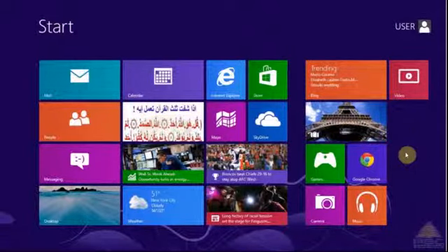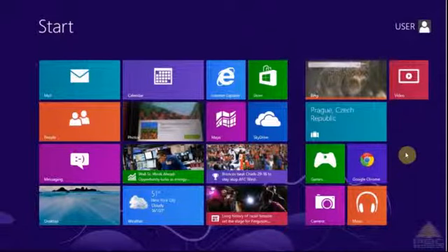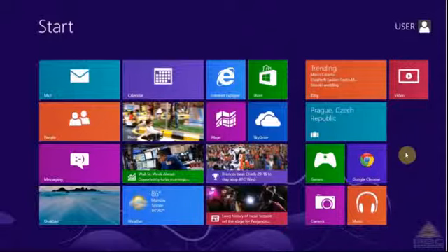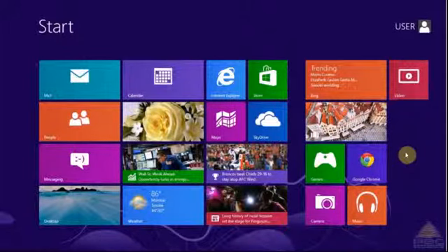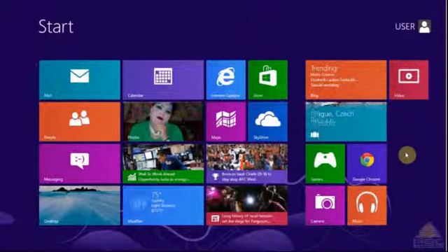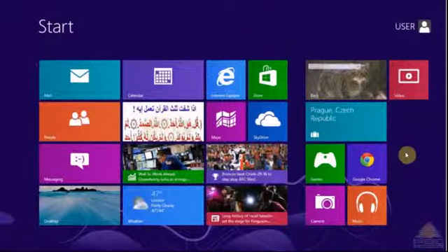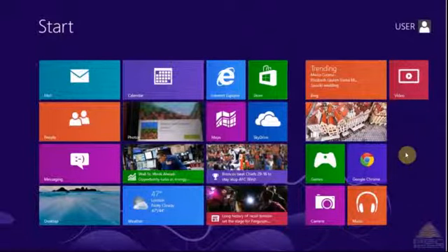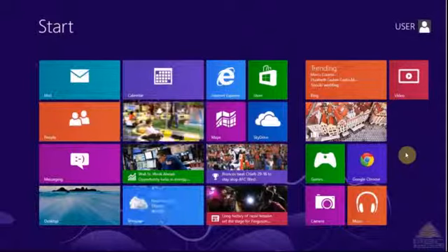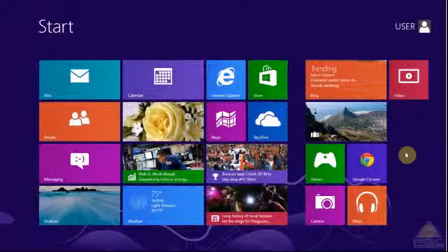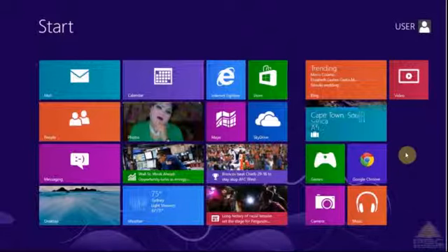So if you have this activity taking 12 days, for example, and it starts here, it will go 1, 2, 3. What will happen here? Double shift. 4, 5. Right? 6, 7, 8, 9, 10, 11, 12. I'm just giving an example of how, when you load your information into the calendar, it will affect the duration. So first of all we have to design our project calendar, and then we upload the tasks into it to get the final calendar days.